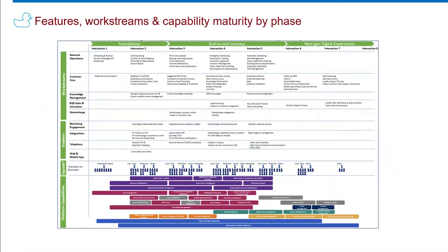And then if you want to know how much it's going to cost to install, as you can see, we need to ramp up on the resources there in the middle. So we go from one squad to two squads to three squads, and then we get to the end and we collapse down a bit. So it's bringing everything together onto one page, and that one page holds people's attention and is really, really useful for a discussion.